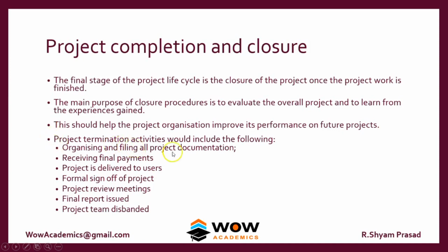Project termination activities would include the following: organizing and filing all project documentation, the third party getting the final payments, the project being delivered, a formal sign-off saying that the project is over and handed off, and a review meeting finally to find out how all the steps in the project have moved and what problems were incurred. The final report is given on the total cost, time, and resources involved, and finally the project team is disbanded.